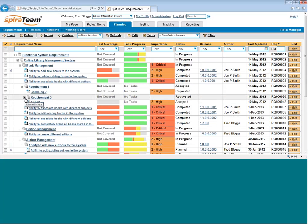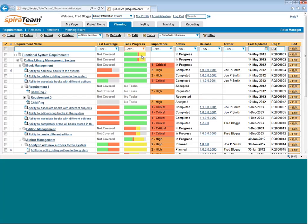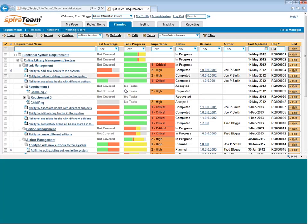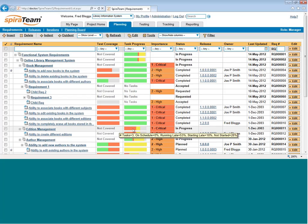You'll also notice there are two special columns associated with Requirements. One is the Test Coverage column. One is the Task Progress column. The Test Coverage column lets you see the number of test cases that are linked to that requirement, and whether they passed or failed or not. You can also see on the Task Progress column how many development tasks are associated with that requirement or user story, and whether they are on schedule or behind schedule or completed. When we go into a particular requirement, we'll see this in more detail.